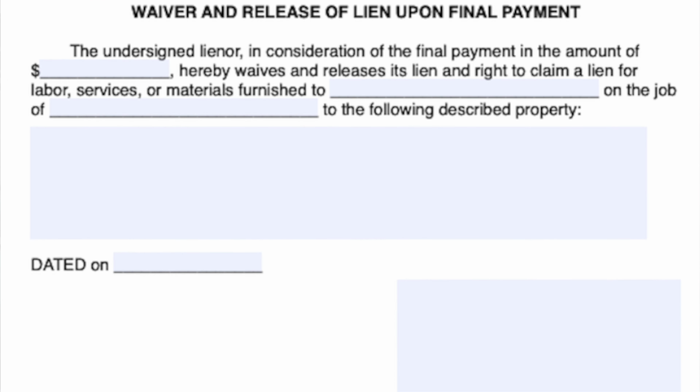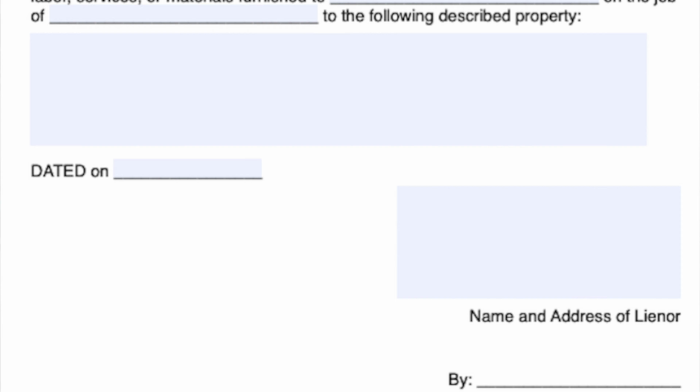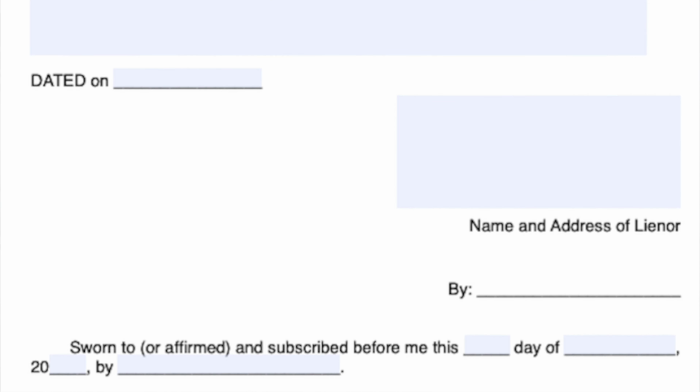So how do you avoid the stress, and how do you avoid disputes between you and your contractor? You need to make sure that your scope of work is very detailed, because that written document is where you would always refer to whenever you and your contractor do not agree on something. It's also important to have a lien waiver, which is a document that proves that I, as a homeowner, paid the contractor everything that is due, and if ever the contractor does not pay the subcontractors, they won't be able to legally put a lien on my property.